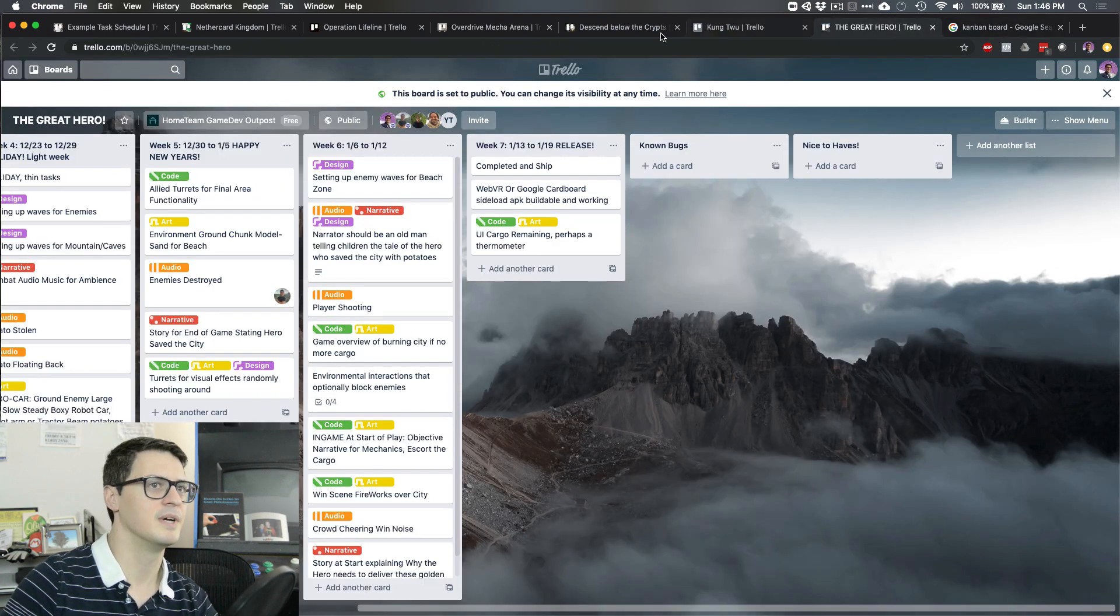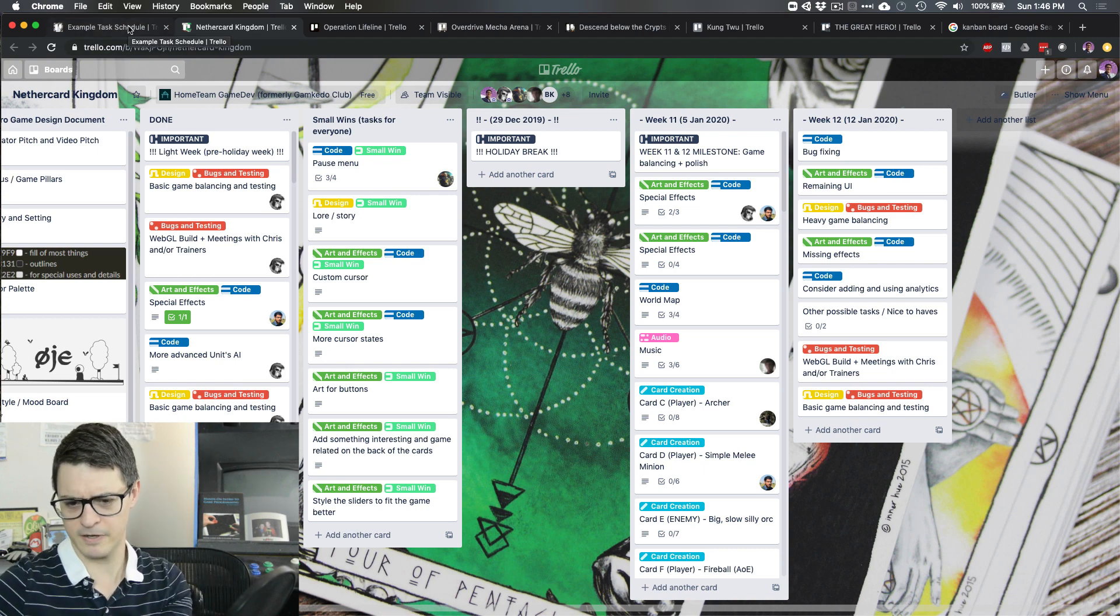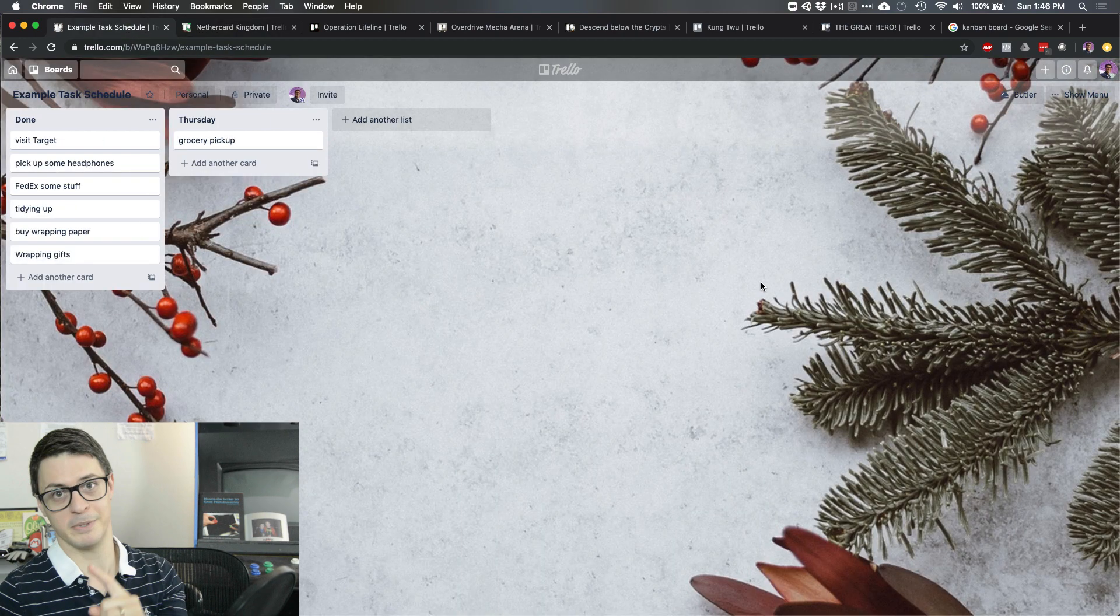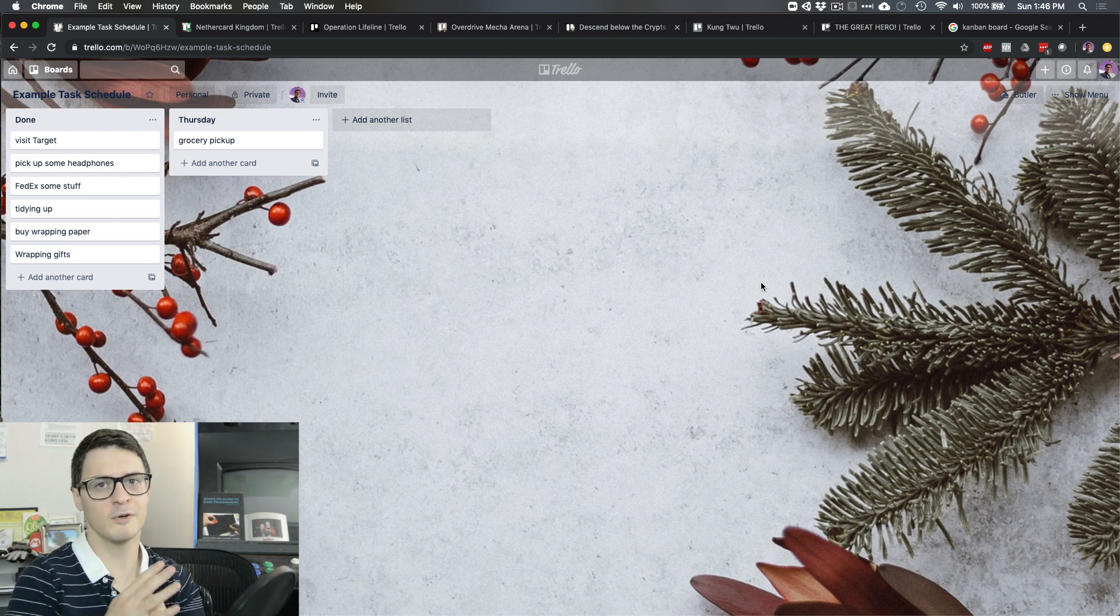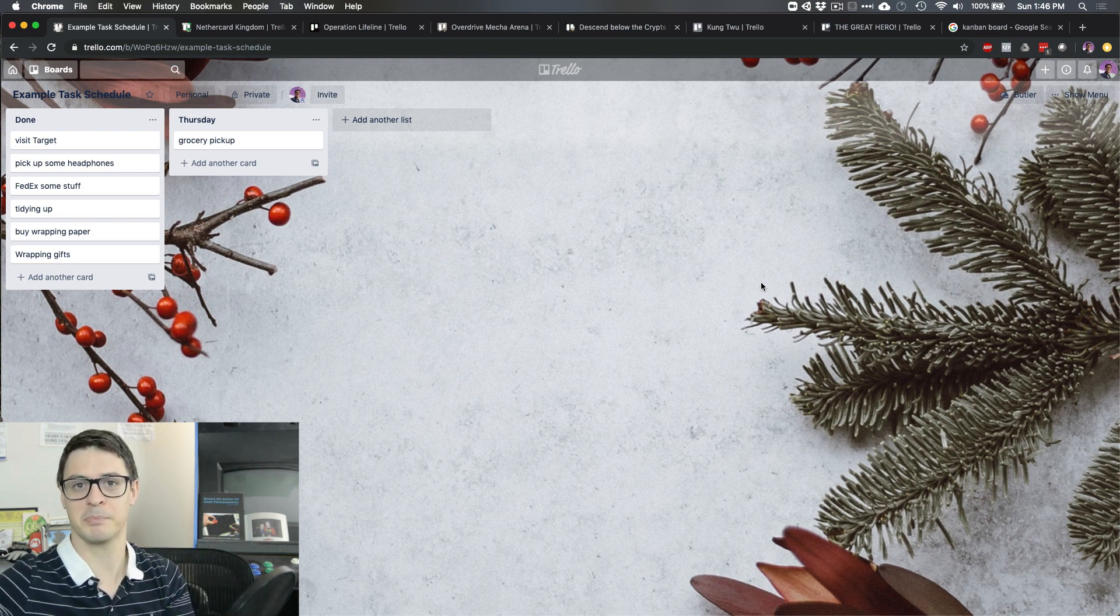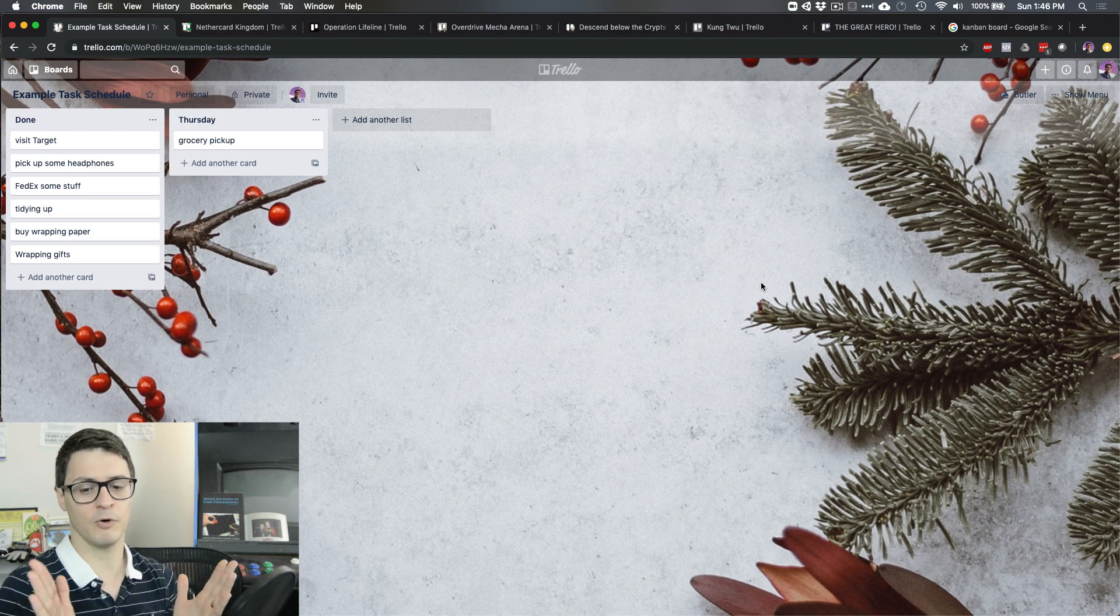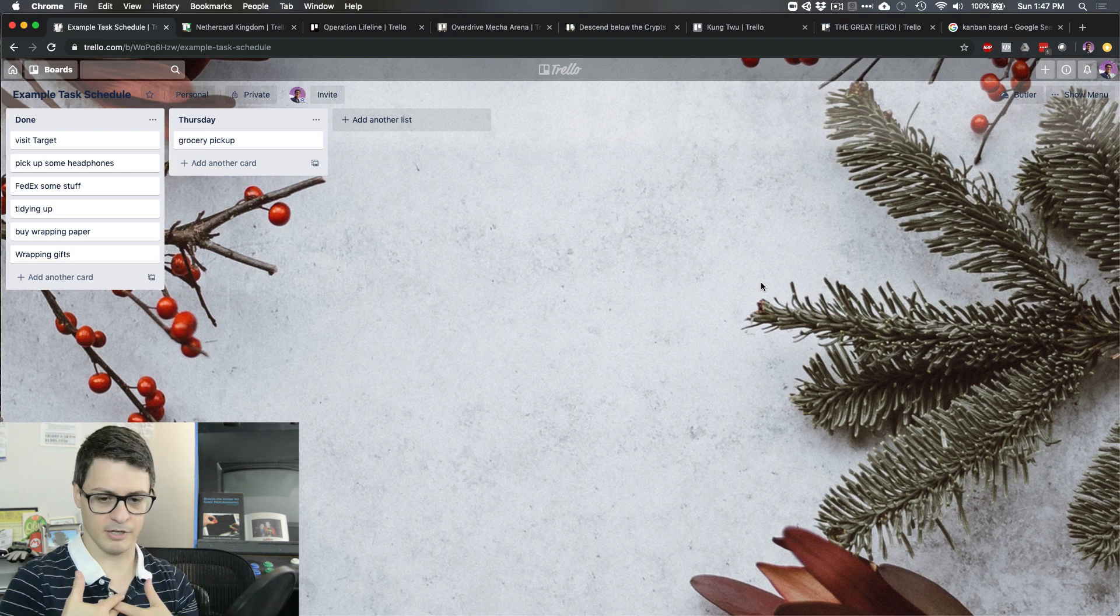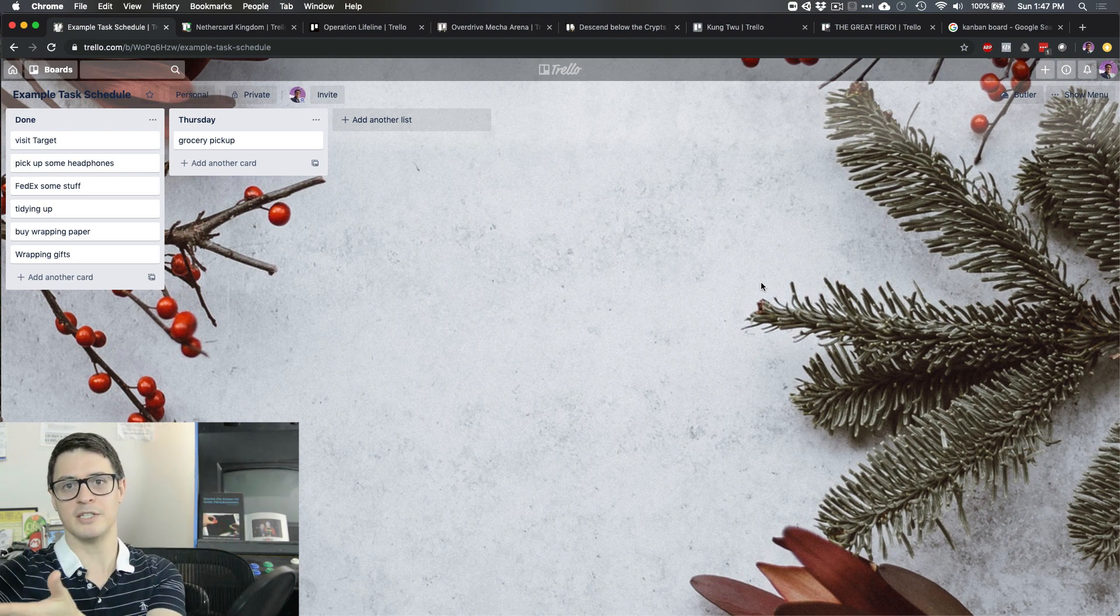You can do this on a weekly basis. If we just took an unsorted column, plan out the weeks, figure out, okay, well, we need the level design tool before we're going to be able to design levels. We need to get the wrapping paper before we wrap the gifts. Whatever it might be, you can set those up to finish your Udemy course you want to take before you try to start that project that's going to practice that skill. And so it's also why it's handy for when you have a goal for 2020. And let's say it's a New Year's resolution. Instead of dumping it all on yourself at once, which can be overwhelming, which can prevent us from doing it because we're thinking about too much at once. You can just put down January, February, March, April, May, June, July throughout the year.